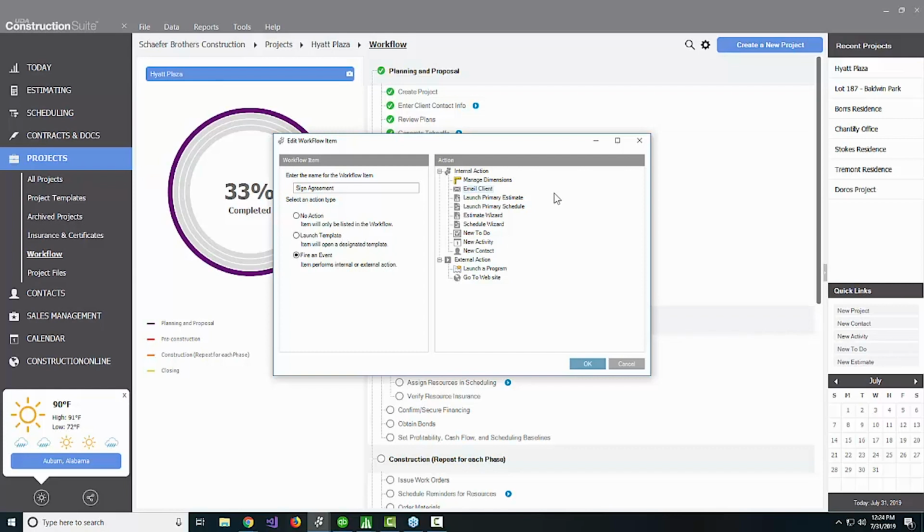I've worked with thousands of companies over the past many years with the company to build estimates, and in part of their sales process, we almost all have some form of a negotiation step. Now, if you do this, I highly recommend you keep your original estimate in the project every time. When you're negotiating, you want to be able to pull up the original estimate, the negotiated estimate, and then as you make any additional changes or add options or whatever it might be, maybe you'll have 3 copies.